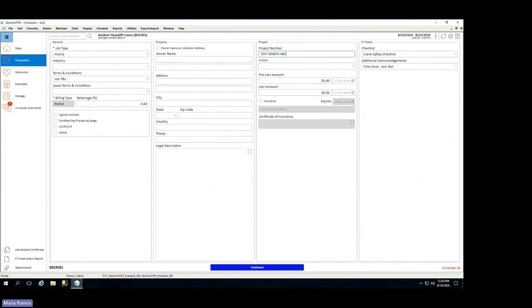And yes, you can add the project numbers after your invoices are created or the job is complete. And somebody did ask about, would it be handy to be able to invoice to a project rather than individual jobs? So there's not a way for you to select a project number when you're creating the invoices. So you would still generate the invoice based on an individual job, and again, run those reports to be able to see the cumulative totals for your revenue and expenses on a project level.